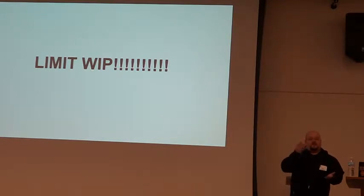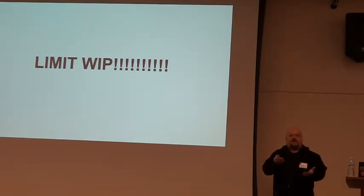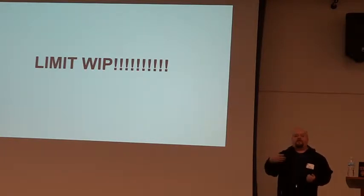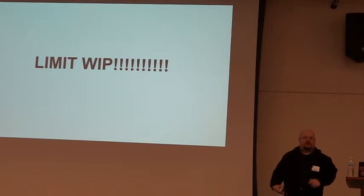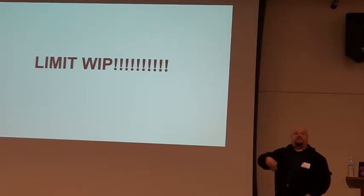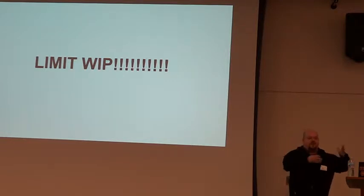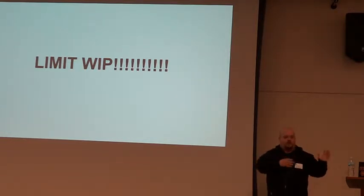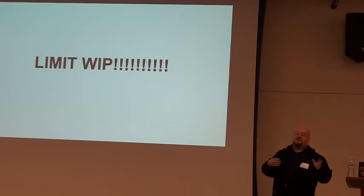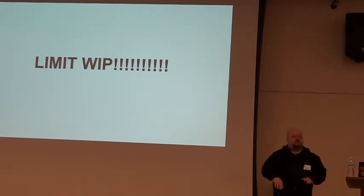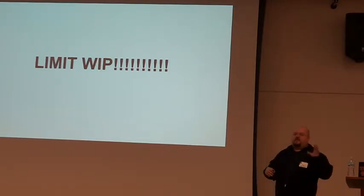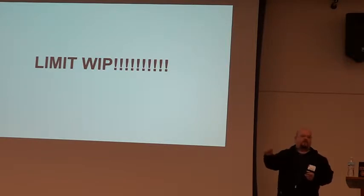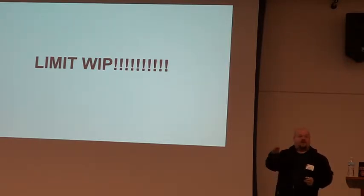When you get to your testing versus your development cycles, you'll find that testers may be able to get through ten cards a week because it's less work to test it than to originally write it. So you may have a testing lane that's ten wide while your development lane is five wide. And what you want is a nice flowing work, work items flowing through the system at a nice rate. To do that, because one's five and one's ten, this is when you'll need a queue in the middle between the two lanes so that as the developers work they can fill up the testing queue and the testers can grab a card and move it across. But they're going to get twice as many of them done at a time.